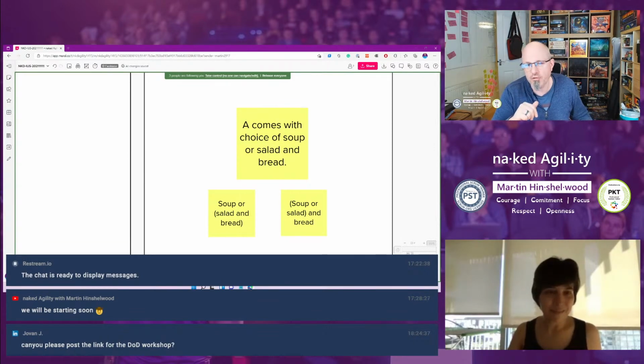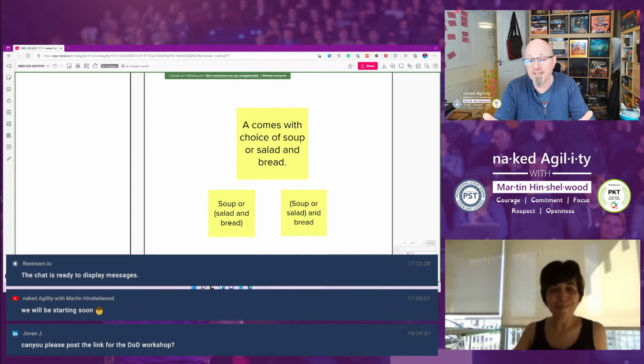Okay, 200 simultaneous users. Awesome. Now I've got 200 simultaneous users, 500 milliseconds. I can put that on my definition of done and run it as part of everything we do. And then we'll always have that. Yeah. You got to ask those questions.